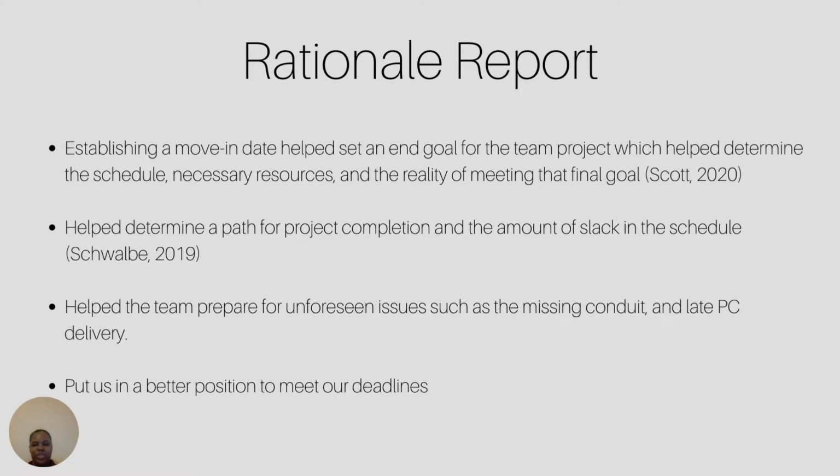After reviewing the overall progress on the project, I believe that the decision to include the staff moving as part of the renovation was reasonable. Establishing a move-in date helped set an end goal for the team project, which in turn helped determine the schedule, the necessary resources, and their associated costs. This also gave us a better sense of the reality of meeting our overall goals.